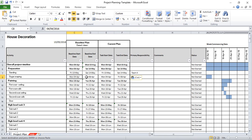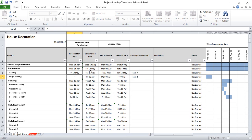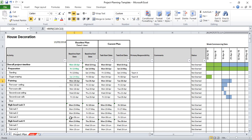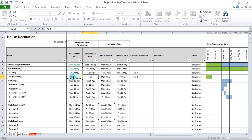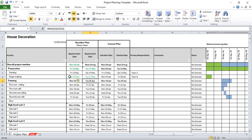For the sugar soaping, I'm going to use a formula to reference the day that I finish the sanding, because I think I can start the sugar soaping on that day — so that's creating a dependency in my plan. Clearly I wouldn't start sugar soaping until I had finished the sanding. So I'm going to start that on the 14th, and then that's going to take me three days. I'm going to click on that cell and say plus three, so that's allowing me to enter in the duration of a particular task.